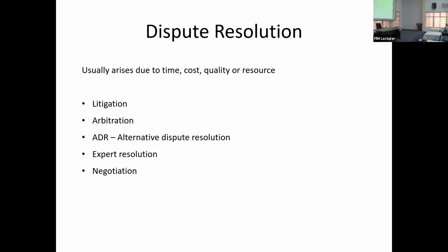So in that case, arbitration is better. The arbitration is defined in the contract: who will be the arbitrator, and so on. ADR, Resolution Council. There are ADRs which are willing to look at it in a neutral manner. If you have a problem, they will look at it and give you their opinion. Of course, both parties agree to pay half-half.